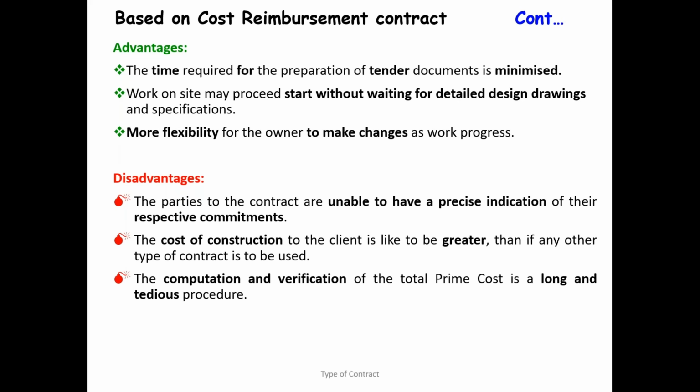Every time there is a payment or a process to pay something, you have to do the verification. That is going to be a very, very difficult task in cost reimbursement. Every invoice you have to check carefully. So under this cost reimbursement contract, we have 4 different varieties, and we are going to see how they were introduced one after another. As usual, I say to you, one lesson learned triggers the second one.